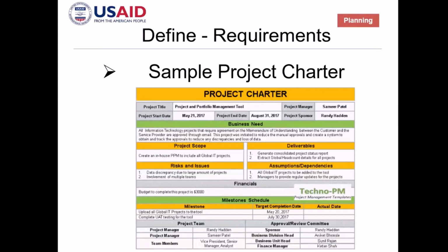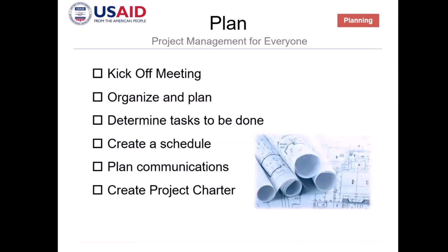You should also be able to identify the risks and issues and the assumptions that you will have to publish as well. For example, if there are limitations in the terrain and you cannot deploy cell sites in that area, you have to provide those assumptions. And of course, the financials, the initial cost of the project, and then the high-level schedule. So we're done with the project charter.